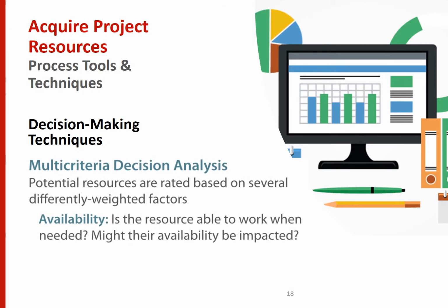Let's have a look at another technique used for acquiring project resources: decision making techniques. There are many decision making techniques out there. You may adopt these techniques to make the right decision. Multi-criteria decision analysis: potential resources are rated based on several differently weighted factors.